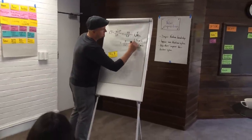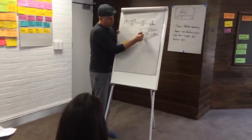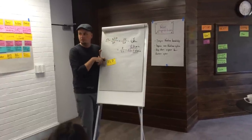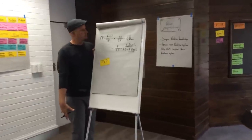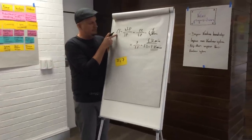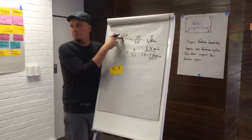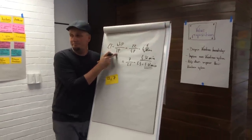So what did we see here? Unfortunately, these numbers are a little bit off. Usually, these numbers are totally the same. And you can just say, if you decrease the WIP, your lead time goes down. So if you don't let too much work into the system, right, your lead time goes down. What else could we do, James? This is your question, actually. To decrease the lead time, we could increase the throughput. Increasing throughput is hiring more staff. Okay? This one is usually much easier and cheaper than hiring new staff. Does it make sense? Yeah?